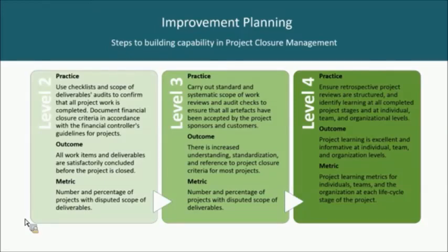Now, if we have a look at a level 2 practice there, use checklists and scope of deliverables audits to confirm that all of the project work is completed. It's not very advanced. That's not groundbreaking stuff. But most organizations are not even doing that.